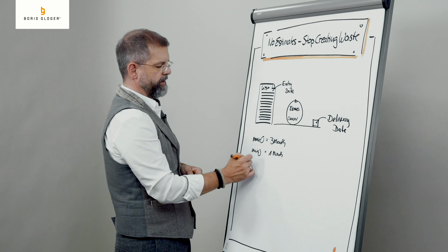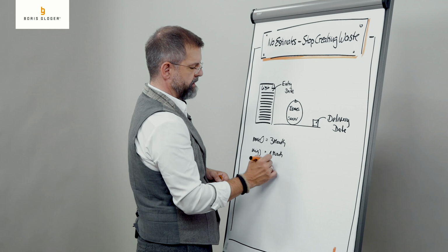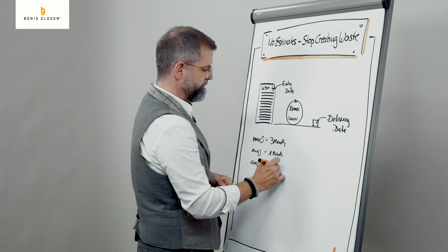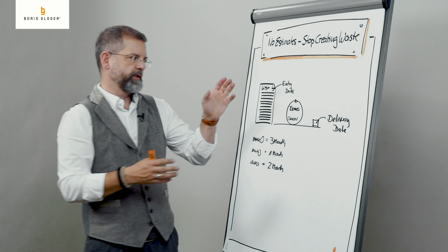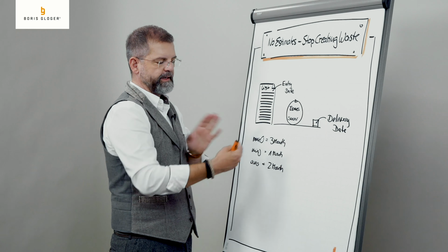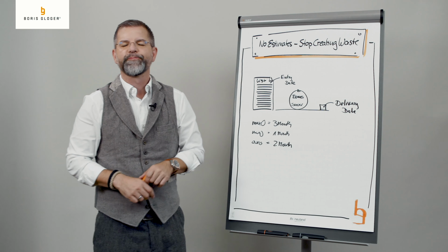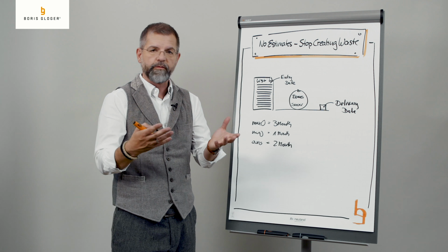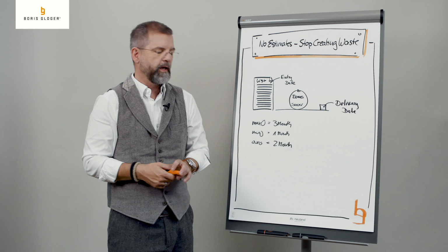And you will have an average cycle time, let's say, to make it very simple, 2 months. So you can put in the entry date and the delivery date. Now you can identify the maximum amount of time we needed to build that piece of work, and, with a little math, you can come up with the minimum and the average.